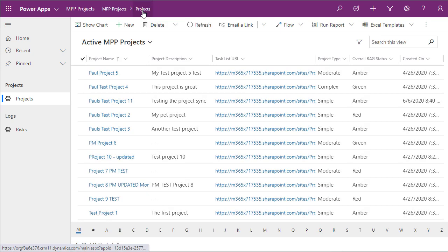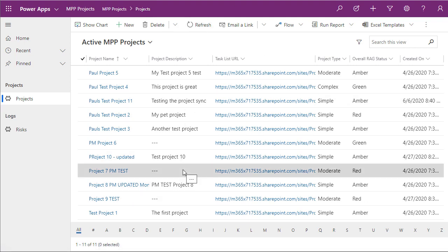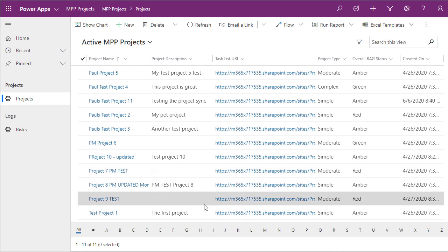It's very basic, but it just shows a way to extend the Microsoft project data when you're syncing to a SharePoint task list. Because if you're just using the standalone MPP files or the standalone task list in SharePoint, to get this sort of cross-project view isn't that straightforward. With this process, pushing it into the CDS, it's very simple. And what that enables us to do then is build Power BI reports.